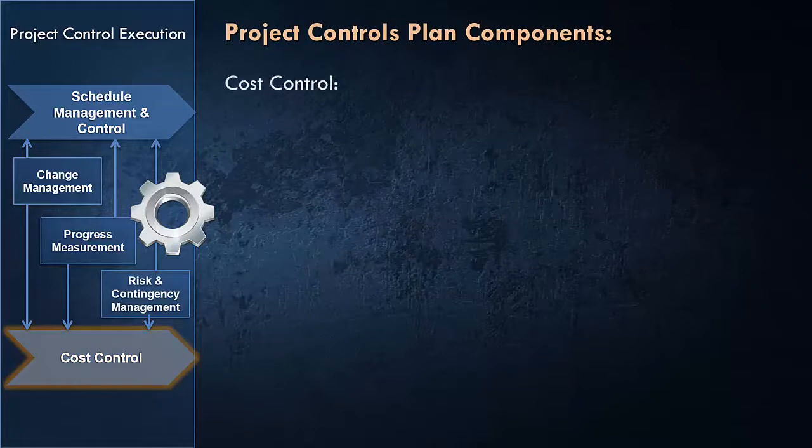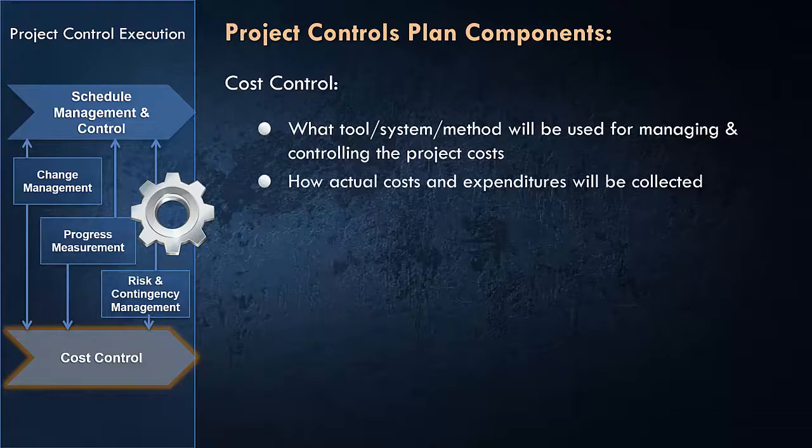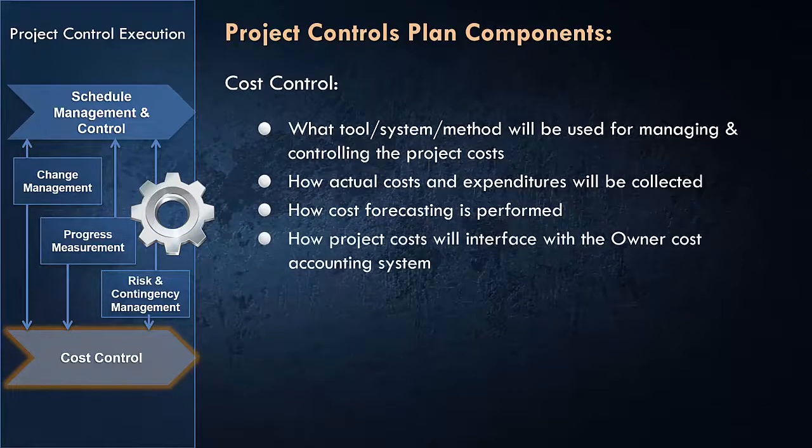So on the cost control element, you need to mention what tools or system or method will be used for managing and controlling the project cost, how actual cost and expenditure will be collected, and how cost forecasting is going to be performed in a project, and how project costs are going to be interfaced with the owner cost accounting system.